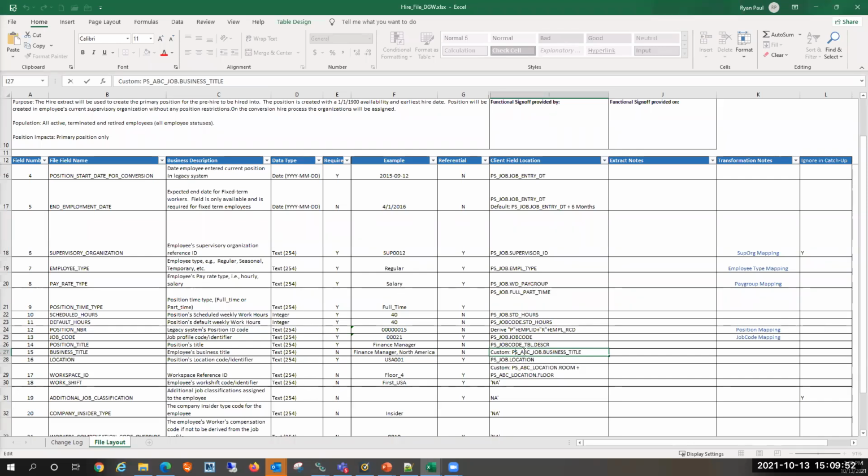will help you make sure that when you're making that selection for your next software, it can handle it, or there will be a solution for it. Or hey, this is a really critical thing that we do, and it is a customization. We need to make sure the next gen can handle it in some shape or form, or what the solution would be. So yeah, if you don't have business process maps today, it would be really critical for you to have them, because it'll also serve you well during the conversion process. Identifying test scenarios you need, identifying configuration you may need, all those things would build out of that.